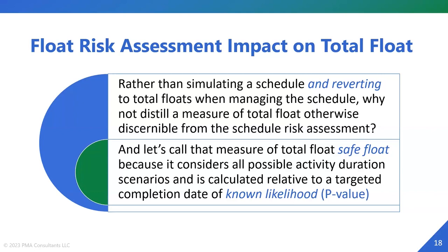We call that measure safe float. Mind you, we didn't make that up. That term was introduced in 1995. But we are basically giving you a simulation, a statistical solution to the theory that was proposed in 1995. And it is truly safe because it considers all duration scenarios. And furthermore, rather than pivoting on a completion date that is unlikely and unknown, you're going to target a completion date with the probability you want based on your risk appetite.